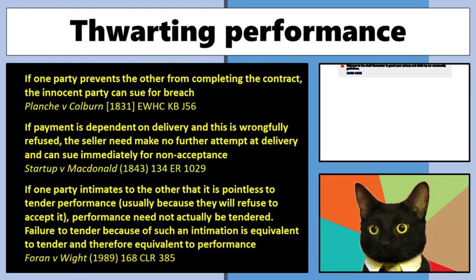Next rule. Just make note, this can come up sometimes in contract law. There are a few little rules that I've got to talk about here. It's a bit annoying because they seem a little bit eclectic. But if the two sides are performing their sides of the obligation, I'm doing my thing, Jean with the boat, I'm doing my thing to try and get the money, she's doing her thing to try and deliver the boat, if we take active steps to stop the other person from completing their side of the bargain, that's a breach.